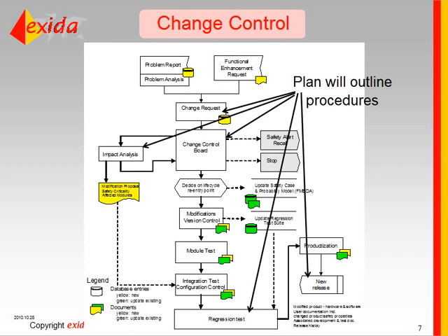Assuming they go forward, you need to, what they describe as, decide where in the safety life cycle to re-enter development. So essentially what this means is when you're making a change, you need to follow the standard development process starting at this re-entry point.